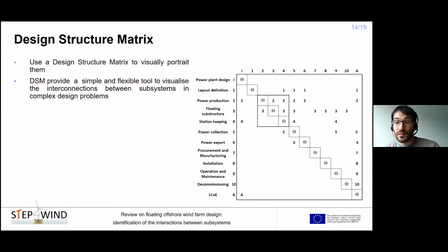The way design structure matrices work is that disciplines, or in my case, the categories that we identified, are enumerated to the left of the matrix and inhabit the diagonal position in the respective row, while feed-forward relationships are represented above the diagonal and feedbacks below the diagonal.